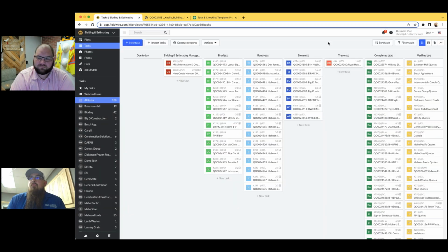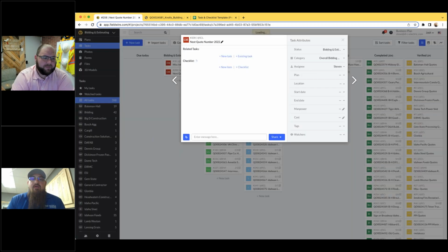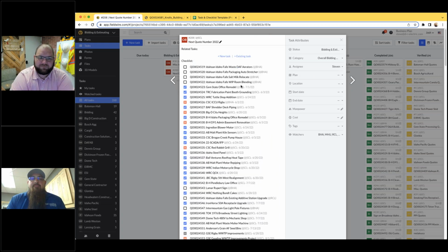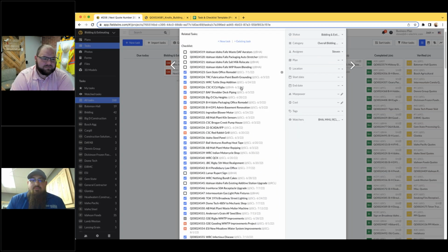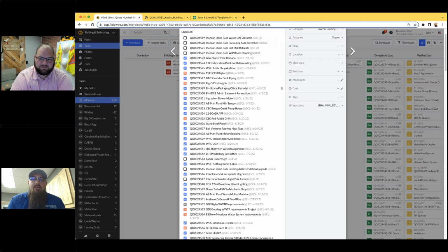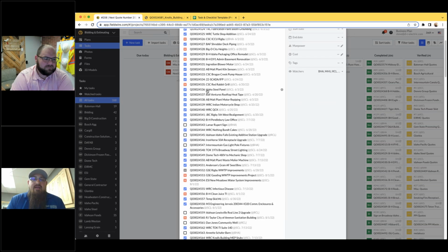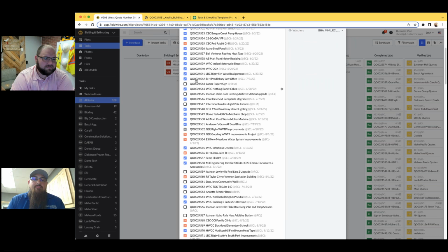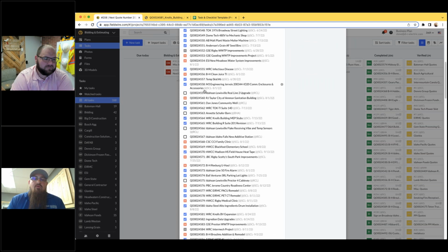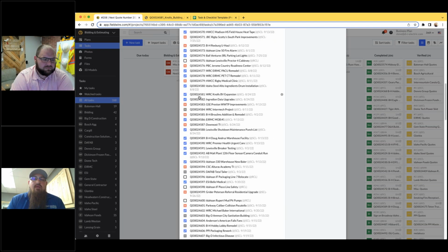So we've had a quote list, and Josh, if you want to click on task 208, you can see how we've generated our quoting procedure, so we never duplicate on our quote numbers. And the way that we've got this is a blue check mark means that it's a quote that's been sent out. A red X is a quote that ended up not being sent out, and a white or nothing or a gray dash is a quote that's being worked on actively.